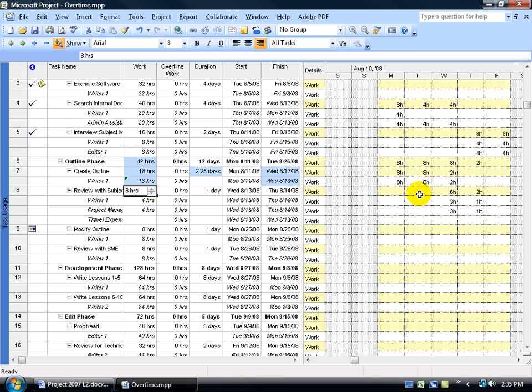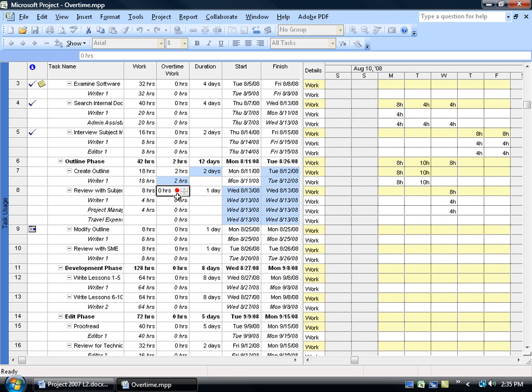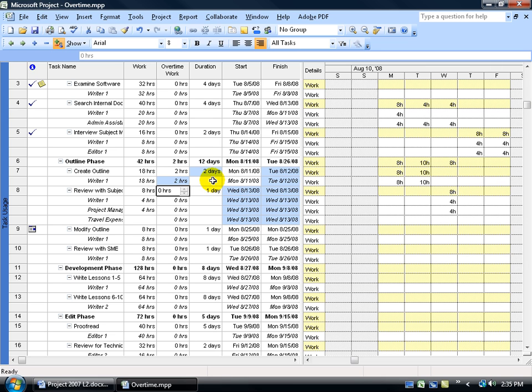You can see in the grid there's still the eight hours on Monday and Tuesday, but it added the other two hours on Wednesday because the typical workday is only eight hours. It can't take that two hours and bump it up and say it's nine or ten. So to make that happen and to assign these two hours as overtime, we want to come over here in the overtime column and increase that by two hours, click off and notice the changes. Instead of the duration of being two and a quarter days, it's now down to two days. Over here in the grid, instead of two hours on Wednesday, it's been pulled back into Tuesday, where he's working eight hours on Monday and an extra two hours on Tuesday.